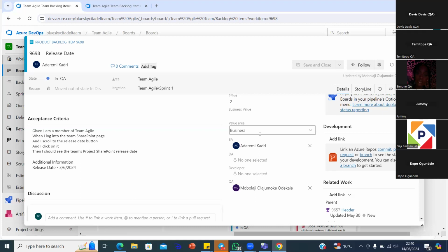Okay, so just to clarify, when the bug has been fixed, we test the bug separately by itself. Once we can confirm that it was fixed, we move it into QA done. Then we go back into QA, retest the user story, the PBI. Once we can confirm that that specific thing is okay, we do regression testing on top of it. Yeah, that's right. But the next question is, how do you test this one?